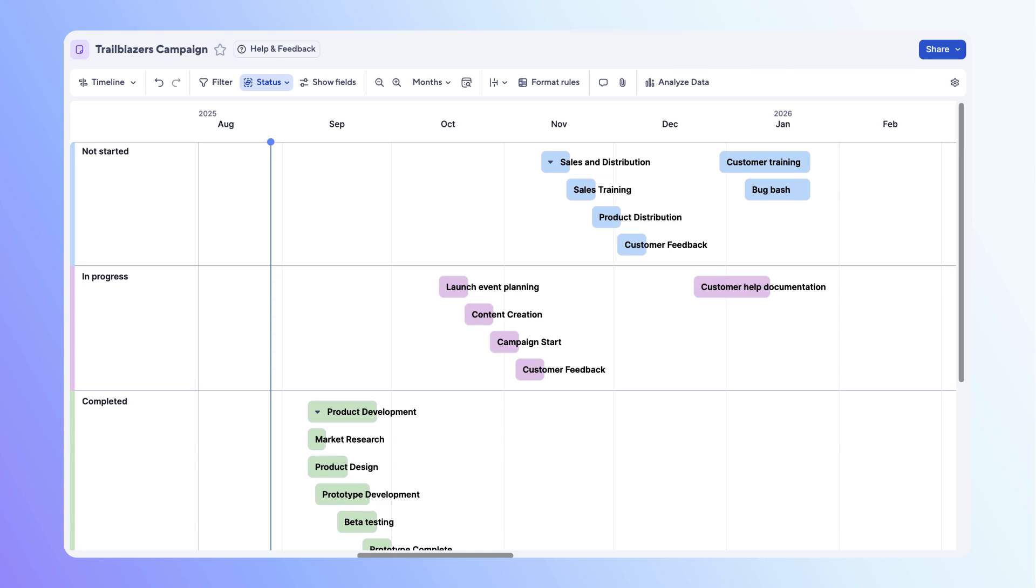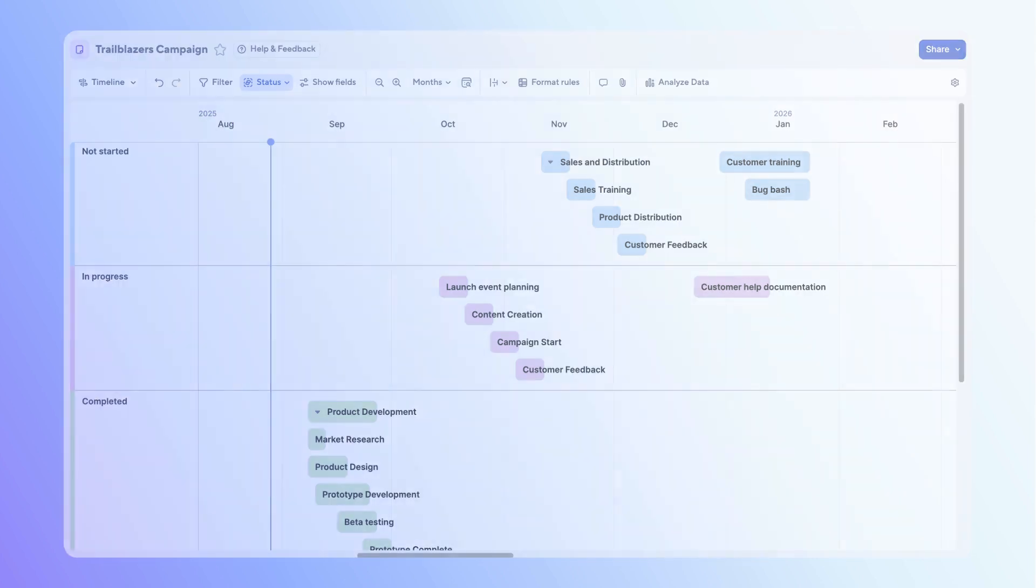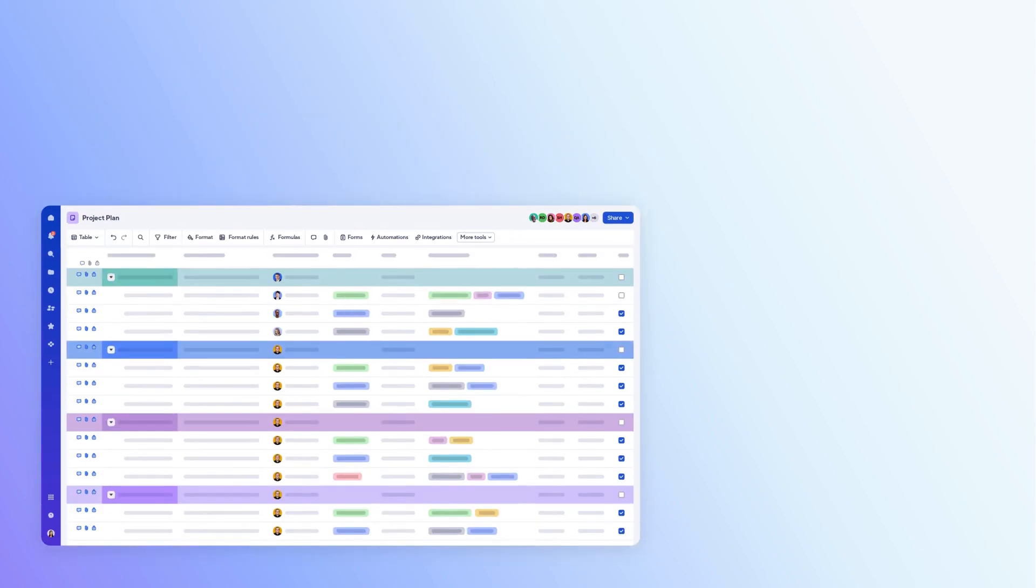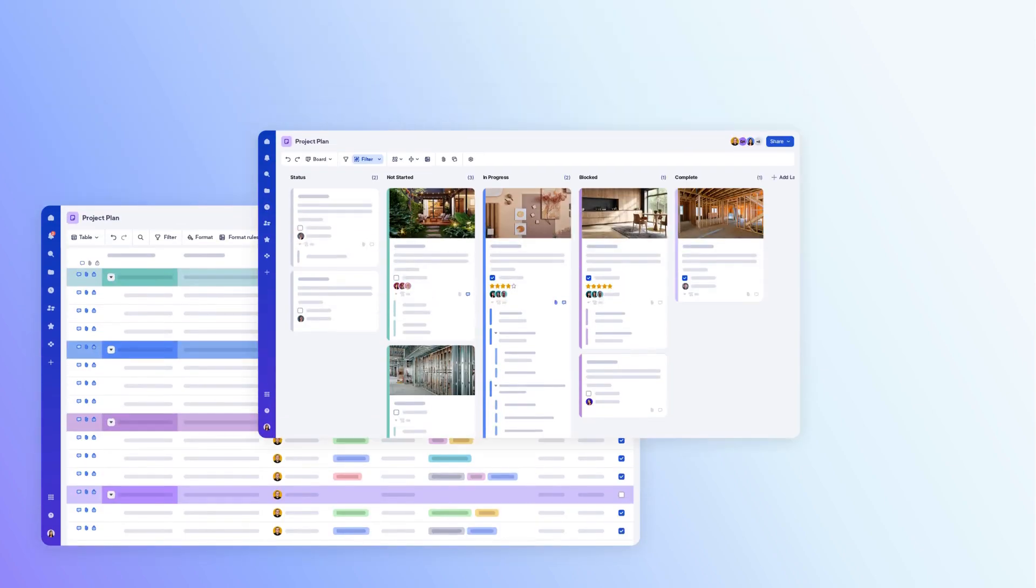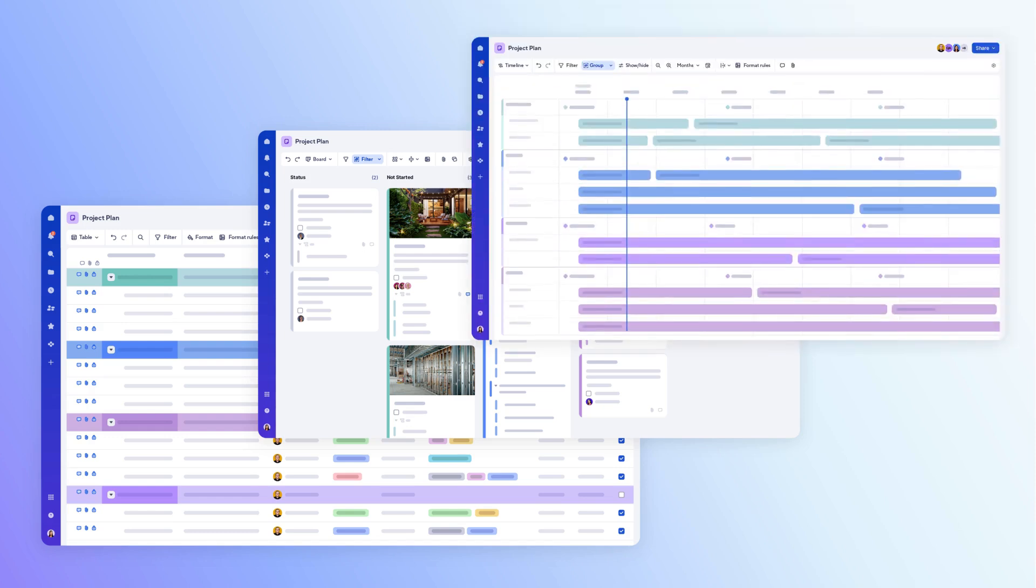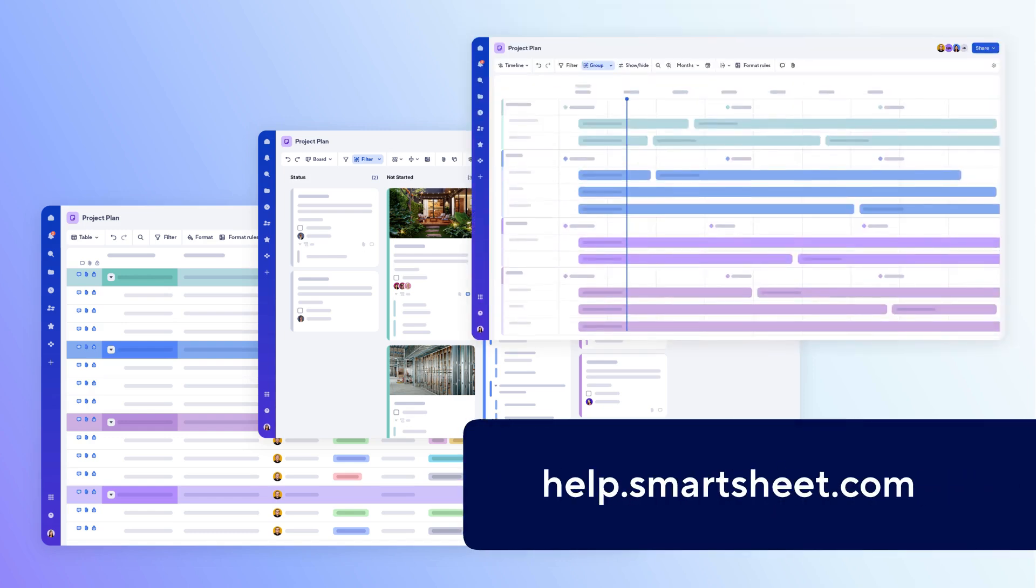Now switch to timeline view from the view picker. Timeline view displays rows as milestones or bars on a horizontal timeline. You can adjust timescale and grouping. Tasks with one date show as milestones, while tasks with start and end dates display as bars. This wraps up how to set up a sheet. Are you ready to jump into Smartsheet? Check it out today or learn more in the Smartsheet help center. Thanks for watching.